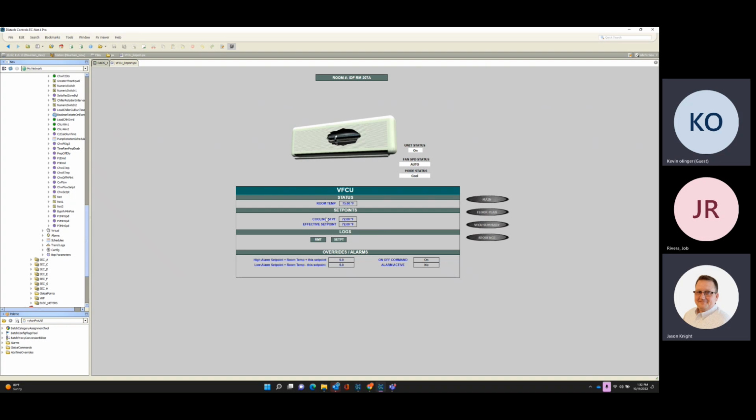Yes, these are all hardwired. Awesome. Yeah, that's a nightmare. You should probably write that into your spec, not to have it wireless. It should be in there because we've had so much trouble with it. I just went to a very large middle school that is all battery operated right now, and I've got to figure out the contract issues. But we should have it in the specs that it's supposed to be hardwired, so we don't have all the batteries to deal with.